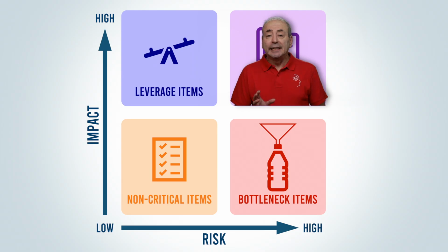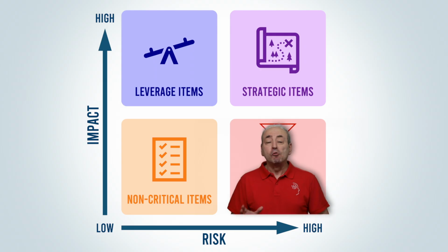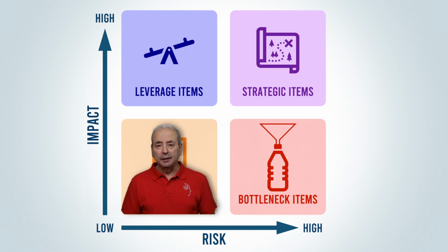For each quadrant, you need to develop your own supplier strategies and tactics. Strategic suppliers need to become partners in your project's success. Leverage suppliers are sources of advantage through cost optimization. Bottleneck suppliers require active risk mitigation, and non-critical suppliers need efficient processing.